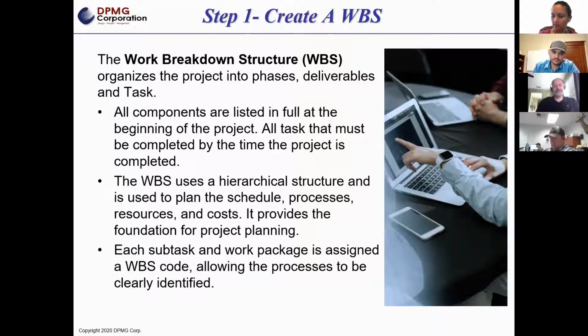One of the key things, and interestingly enough, we had a conversation yesterday working with some folks in regards to their accounting piece. One of the things we say is you should be using the work breakdown structure. Defining the work is how you should be defining what we call the work breakdown structure codes, which equates to how you track the project financially. One of the disconnects that we see a lot, especially in companies that do project-focused work, is there's a disconnect between how a project is performed versus how it's financially tracked.